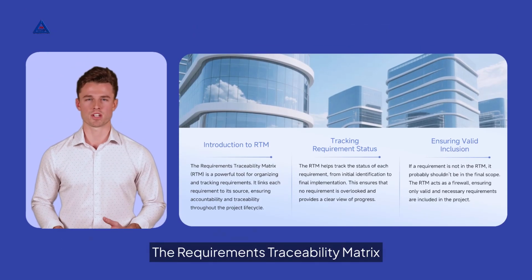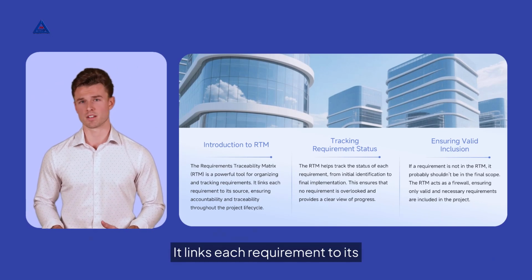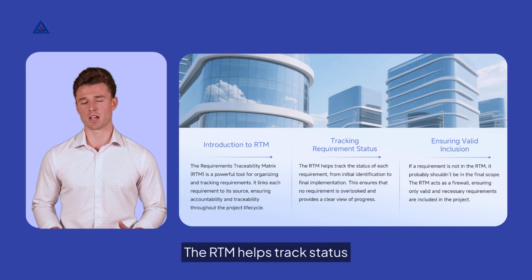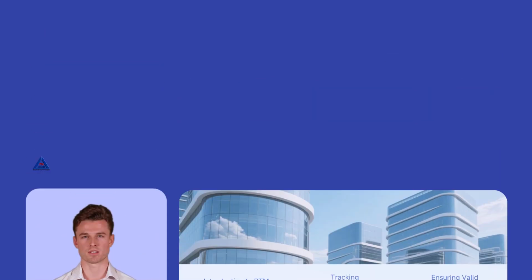The Requirements Traceability Matrix, RTM, organizes and tracks requirements. It links each requirement to its source, ensuring accountability. The RTM helps track status and ensures only valid requirements are included in the project.